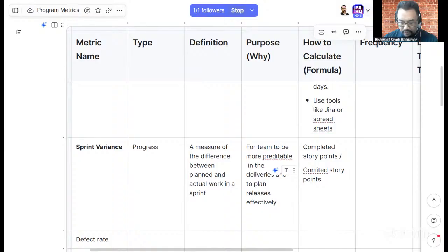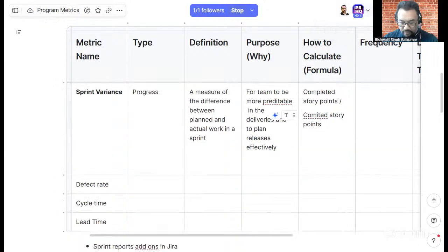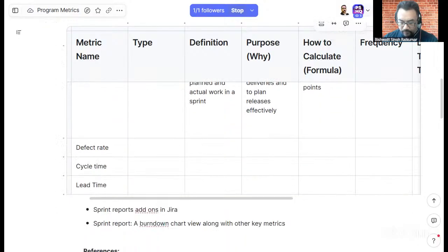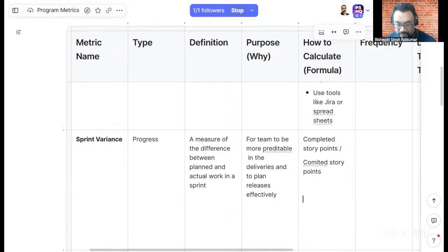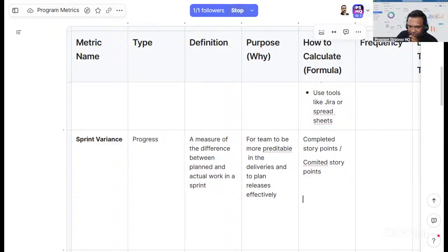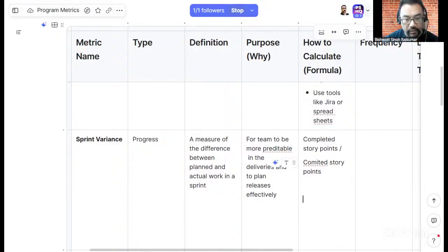Okay. This is more of an actual velocity minus average velocity divided by average velocity. Let me see if I can ping you that. Into 100, is it? Yes, into 100. Okay. Can you put it in chat? I'll check it out.